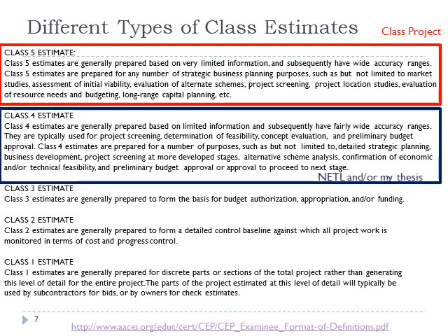With either NETL or stuff in my thesis, we're probably working more in the area of a class 4 estimate, which means that you have some information and you've done some scale-up development, but it's not to the point where, when you're at a class 3 or 2 estimate, these are actually what are being used as the basis for budgets